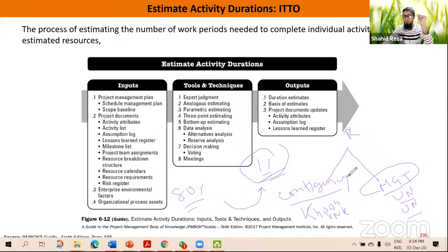These two situations can happen for any activity, for any project. So for each activity, you have to find out the known unknown situation if there is any, and keep contingency reserve. As we are in the time schedule chapter, we keep contingency on time. So for 10 days, we may put another 2 days buffer.